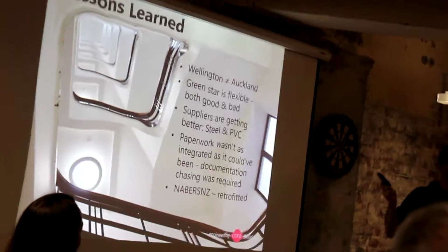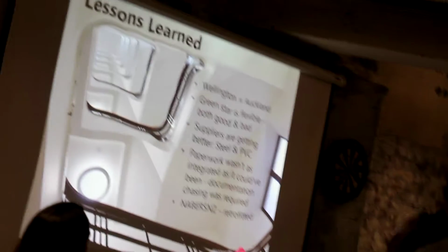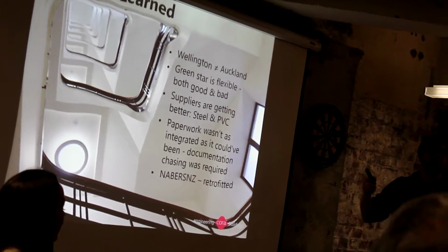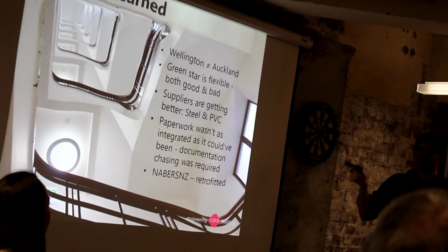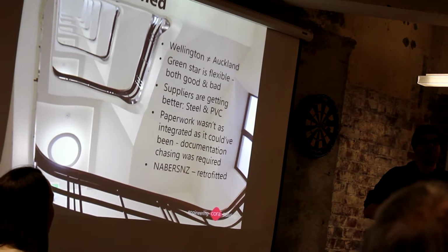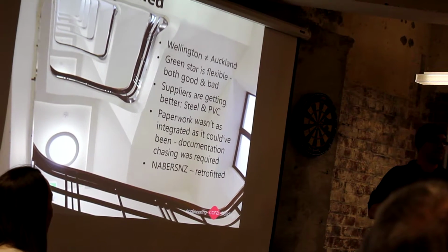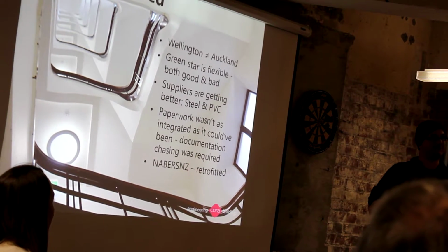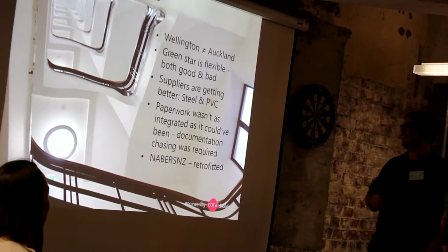In Auckland, it's quite easy to specify what I'll call eco-concrete, a lower embodied energy concrete. That's Environmental Choice New Zealand rating. So you can get that concrete materials credit quite easily, and I've been told quite inexpensively as well, in Auckland. But you can't do that in Wellington because it's not available here. And you obviously can't import mixed concrete from Auckland.